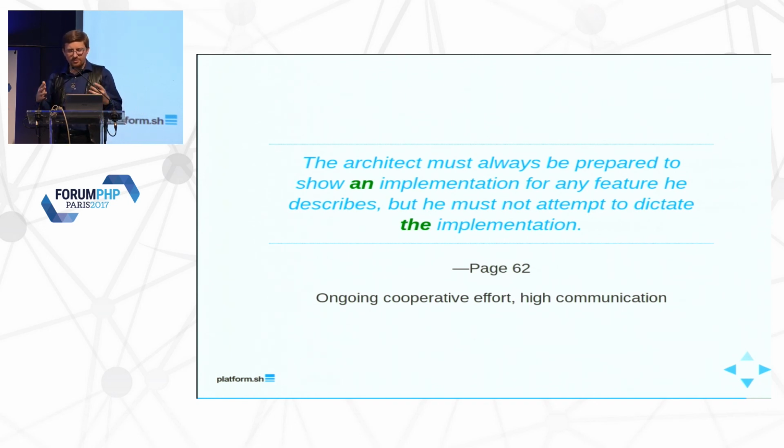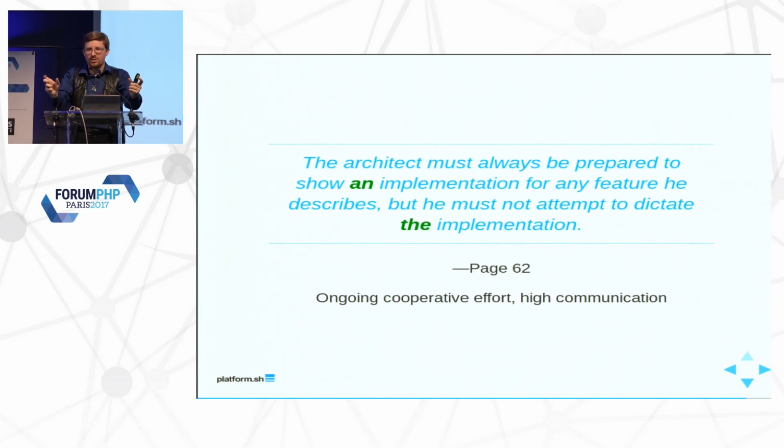If you have a larger system, you break it up into pieces and have sub-architects for different parts of the system, which also reduces your communication channels. Your lead architect communicates with your sub-architects, and they communicate with the implementers in their areas. You have vastly fewer communication lines now that you need to worry about. I don't need to worry about talking to people working on a different team. That's a communication line we can get rid of.